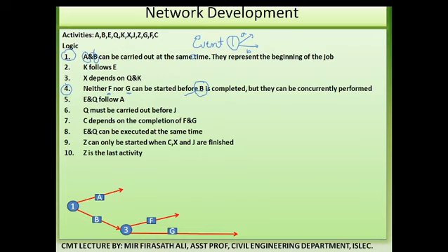See, we have introduced one event over there. An activity cannot start directly after an activity; an event is needed in between two activities. This is activity B, represented by an arrow. Again one event we need to insert, and again an arrow. We cannot add just two activities together. One activity like this and again one activity like this is wrong. There should be insertion of one event in between them, for F and G.